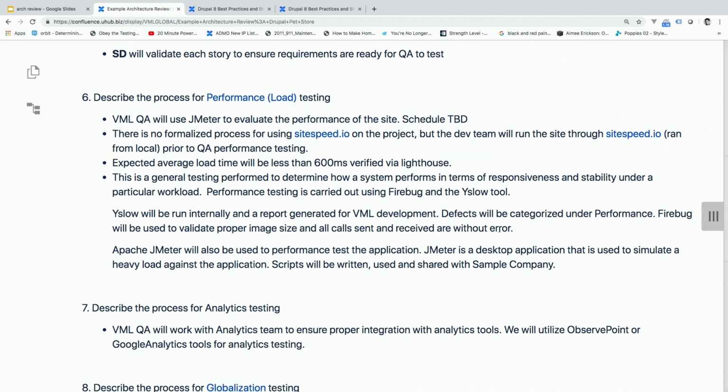Did you tell your hosting environment? Because they're probably going to get mad. So make sure that we actually have a real process for that and that the hosting environment is okay with it. Same with security scans. Your hosting environment might get mad if you try to penetrate their website or their server. So most of them want to know 24 hours in advance. I don't know how everybody else's hosting environments work, but I know that's a thing that we run into.